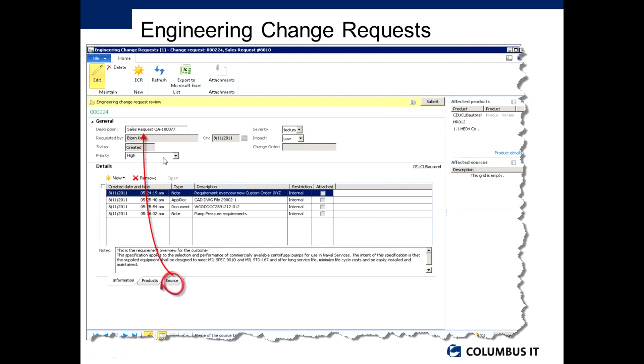You also see here you have things like a status to this engineering change request, it has a priority, severity and impact to it, and eventually if that change request becomes approved, that will then become a change order.